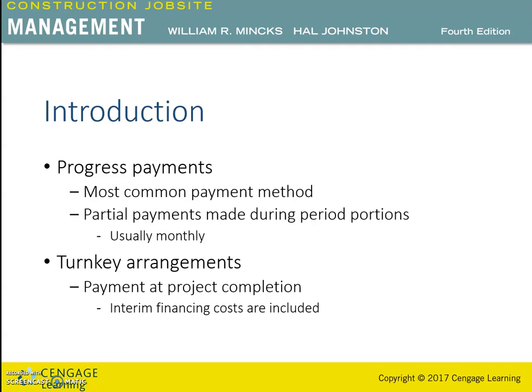Although these arrangements require payments after the construction, accounting for the percentage complete at periodic periods is still necessary, usually to justify financing payments. As the monthly progress payment is the most common method of payment in commercial building construction, this topic will primarily deal with the procedures concerning these periodic payments.